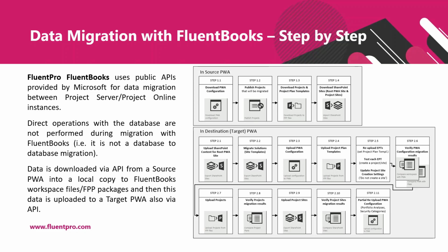Once the activities in the source PWA are completed, we would switch to the next portion of the activities, and they are done in the target PWA or destination PWA. The first step is to upload SharePoint content for the root PWA site. This step is done first because there might be workflows that depend on the lists that reside in the root PWA site. During this step, you would also perform user